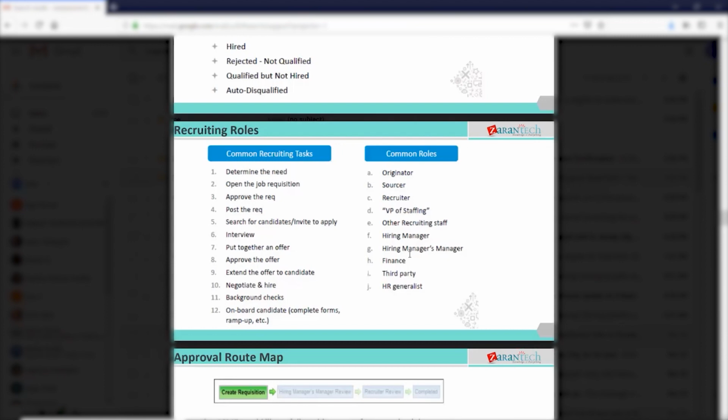Once they sign off, only then will we start the workshop discussions. We won't start workshops immediately. That is called the SOW, right? The SOW will be generated before the workshops, before workbook creation. In that SOW, they will decide what features they want, how many consultants they want, what the timeline would be to complete these things, and how much budget it is costing. All these things. The SOW will be taken care of by the project manager, not by the implementation consultants or the offshore team.